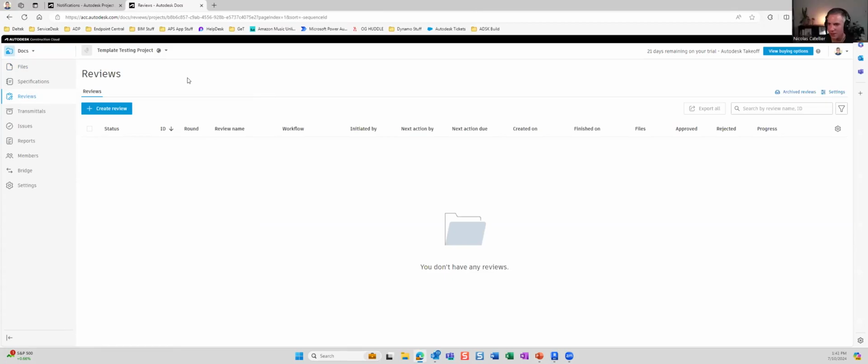Okay. What we are currently using it for, and we're still mostly testing this, but we're getting positive feedback, is adding the owner to our project. We send the CD or milestone deliverable via review to them, and then they can mark it approved, noted, questions, things like that. It's really great because we've really struggled in the past to quantify owner review or owner approval of scopes of work or deliverables, and this makes it concretely clear.